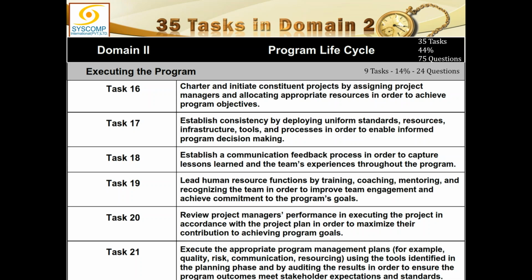So now this project is specifically under the program, and therefore the program governance, which is actually used for the development of the program management plan, would give guideline for project governance. So there could be one project governance structure for all the projects within this program, and all the project managers would have to abide by it and develop their project management plans accordingly.